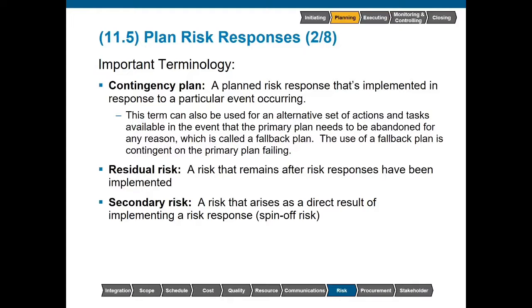I like to use the example of going on a camping trip. If we have a situation where the weather gets entirely too cold and the sleeping bag is just not keeping you warm, you can go ahead and start a small campfire. This would be the contingency plan. If you're unable to find any amount of wood that's dry enough to start a fire, then you can always go back to your car, drive to a hotel, and this would be a fallback plan. We are abandoning part of the project.